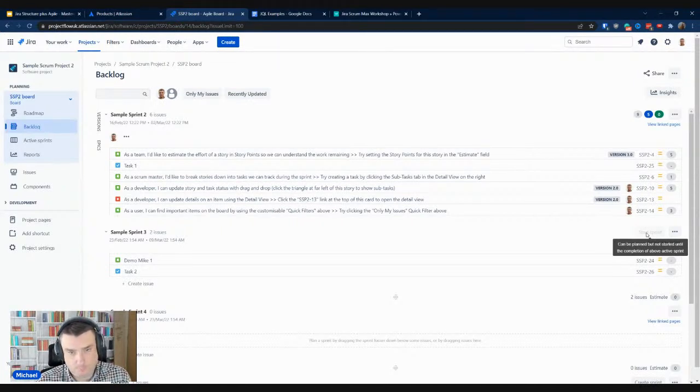What does it mean? Of course, we can have only one active sprint. So to create a new sprint, or just to start one, because we can actually create, we have to finish our previous sprint. So the question is, can we change it? And the answer to that is absolutely yes, but I am not going to show you how to do it. It's a very simple process. You need to go to the settings, find the sprint options, and make sure that the parallel mode is set to on. However, I am absolutely not recommending that setting, because I've never actually seen that work.